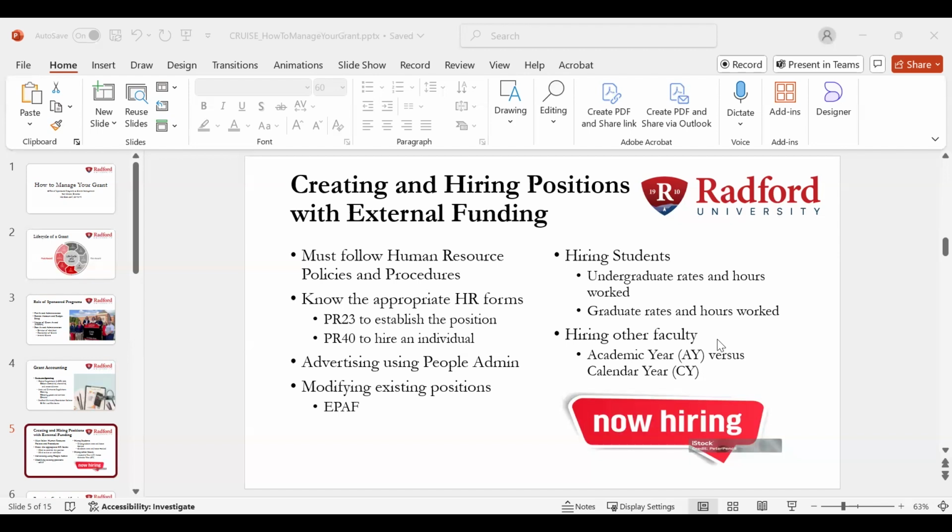Or 9-month faculty members can charge summer stipends. So if you have a federal project, Stockton mentioned the REU project that is funded by the National Science Foundation. If you are 9-month faculty, most sponsors will allow 9-month faculty members to receive extra compensation in the summertime to work on projects.